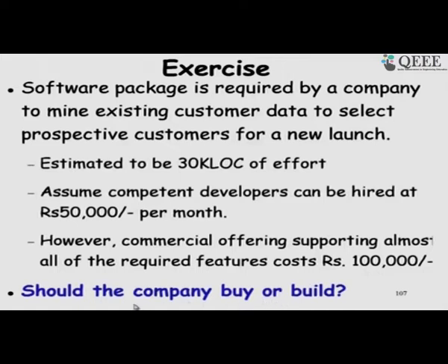So, the question is: should the company buy or build the software? If we only compare the amount to be spent and make our decision based on that, we may not be doing the correct thing. We have to consider several factors in a buy or build decision. For example, once we develop the software, the intellectual property is with us. Even though we initially spent some amount which is larger than buying off the shelf, can we sell that software to others?